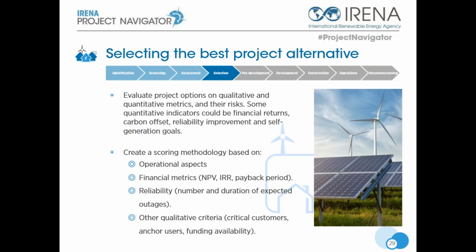This is basically selecting the most promising project alternative that we have, and at this point, developers should rank their options according to the assessment we just made and select the most promising one. The project developer evaluates potential options on both qualitative and quantitative metrics, and also based on the risks. A comparative scoring methodology may be developed by setting